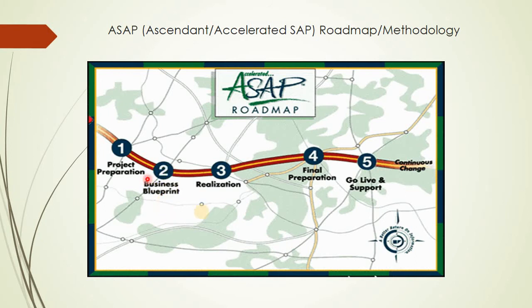On the basis of the blueprint, the consultant does configuration and realization of that configuration in the development instance. Then final preparation. Once the development instance is ready, then it is moved to quality checking, the QA instance. Then final preparation for moving that implementation to production. Then go live support and changes.